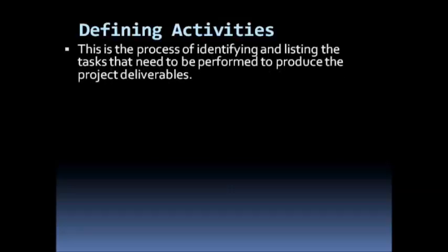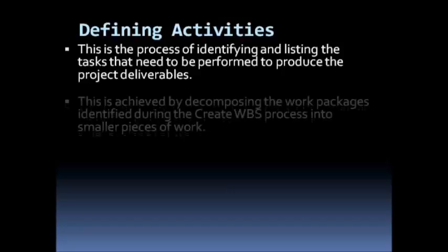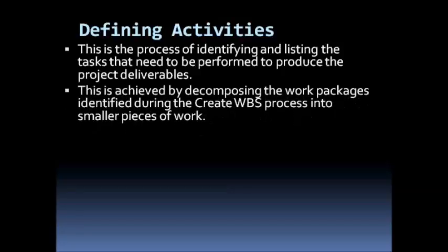So the process of defining activities is talking about identifying and listing the tasks that need to be performed to produce the project deliverables. And it is achieved by decomposing the work packages identified during the Create WBS process into smaller pieces of work.